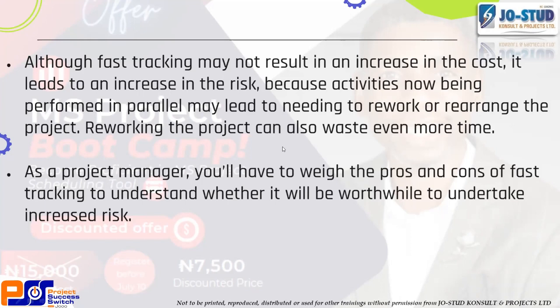So you may now have people who may not have achieved what you wanted them to achieve. Now, reworking of the project, if the project manager is not careful, you may end up wasting the time you wanted to compress simply because your risk mitigation strategy failed you.